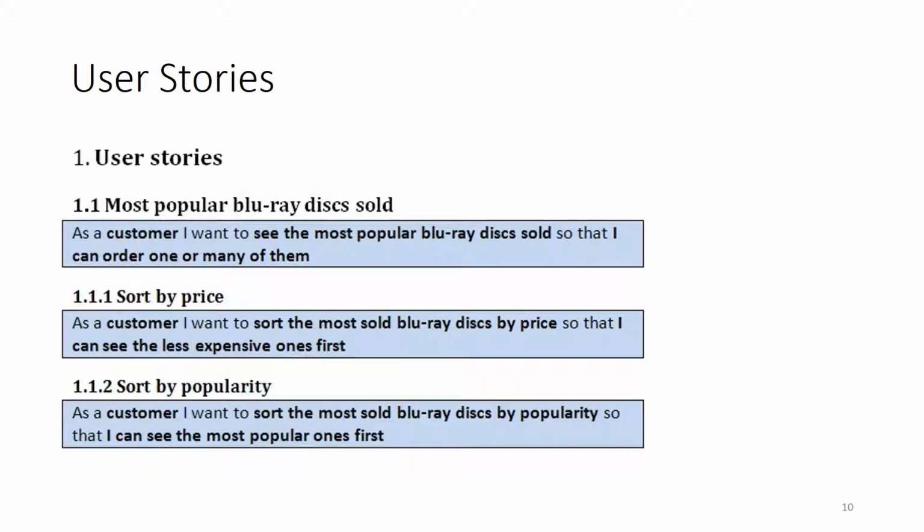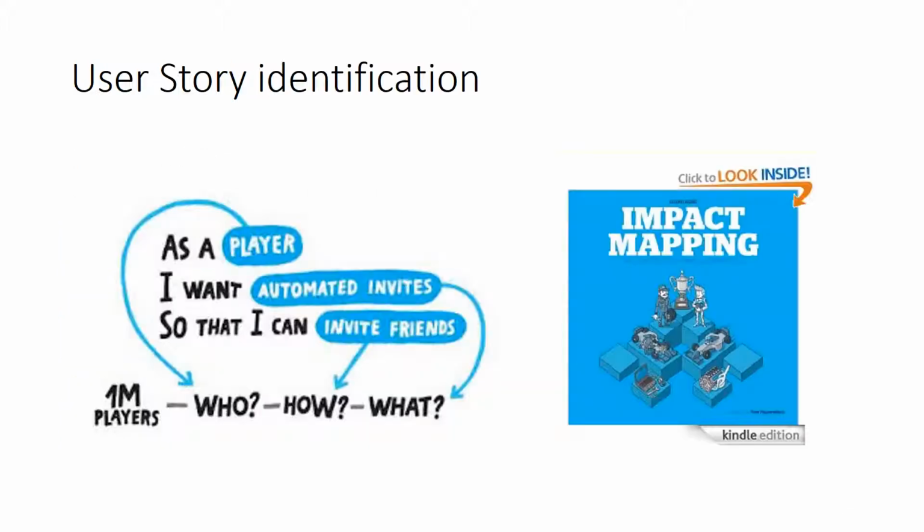And here we see some examples of user stories, and we see that the idea is to keep them short and very understandable. The way we state user stories is like, as a customer, I want to do something, and it requires implementing some functionality in the system to comply with this user story. And there are different processes for how we could design these user stories.